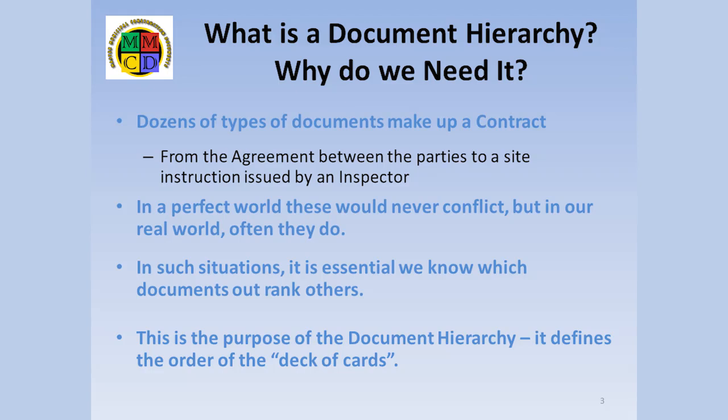There are literally dozens of documents which form the entire contract set. I'm not talking about the number of pages, but actual different types. For example, the most powerful document is the agreement between the owner and the contractor, but everything else flows from this document. But numerous types of documents are part of the tender package. These include general conditions, specifications, standard detail drawings, and specific project design drawings.